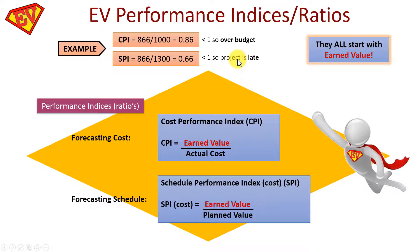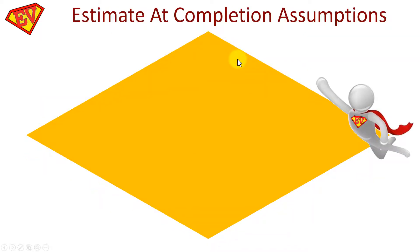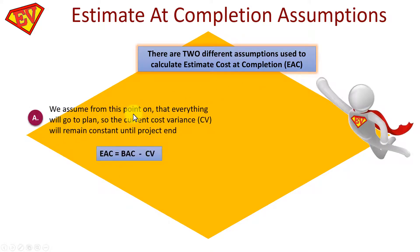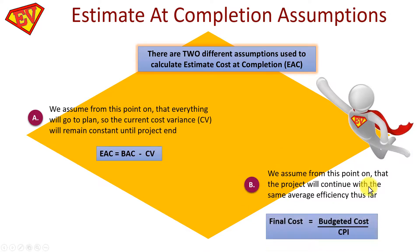For Estimate at Completion (EAC), there are two assumptions. First, if you assume from this point onwards everything will go to plan — the current Cost Variance remains constant — then EAC = BAC − CV. Second, if you assume the project will continue with the same average efficiency (CPI continues), then EAC = BAC ÷ CPI. The question will state which assumption to use, so be aware of both.